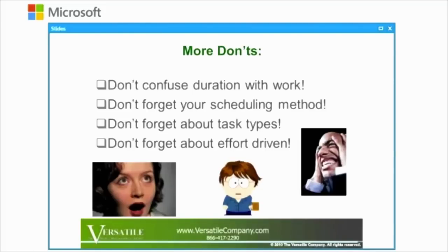As soon as you do, the task type kicks in, and those variables become very much calculated. Last here, hey, don't forget about effort-driven. What that means is that your effort on tasks is going to drive the task durations. Task durations and effort control cost and the schedule.